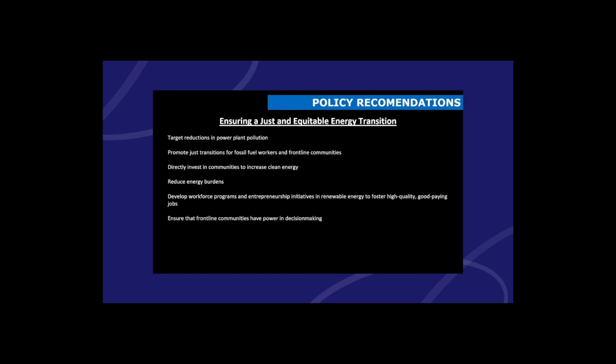Also, we need to ensure that frontline communities have power in decision-making, especially connected with all the siting and permitting processes, mining of transition minerals, those projects that will be directly impacting them. Those communities need to be at the table participating in how the decisions are being made. And that touches on something that Joe was also mentioning. There are studies showing that that kind of engagement in the long run helps projects move forward, instead of a position of, we are going to be doing this and you just take it whether you like it or not, and then there is opposition and pushback that actually delays projects much more.